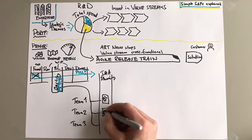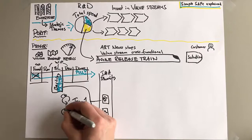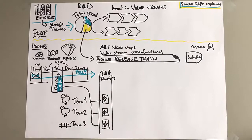A common planning session, meaning all the people together in one room. And that's why we also call it Big Room Planning. And that's actually - this builds on Scrum. You see your timeline developed into sprints, a two-week sprint. And for every big iteration you have the sprint called iteration.